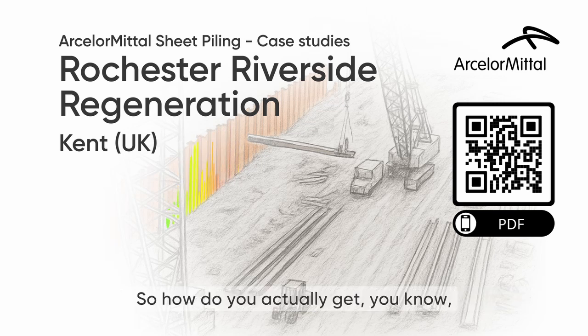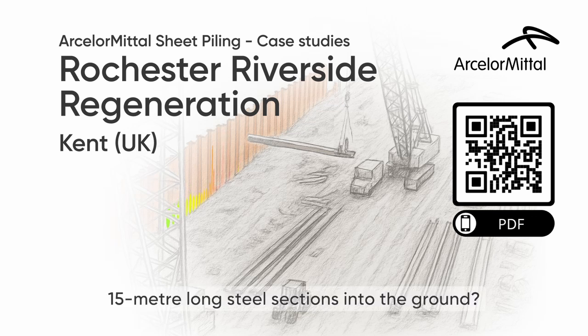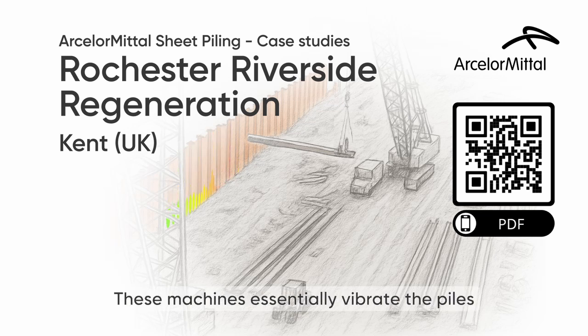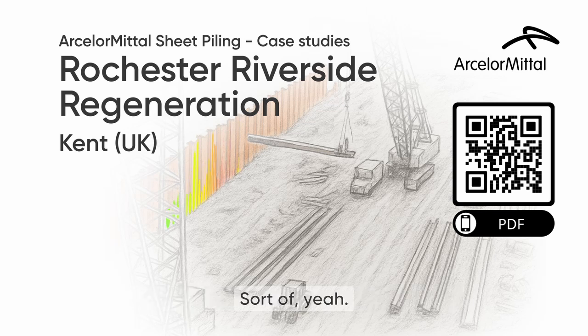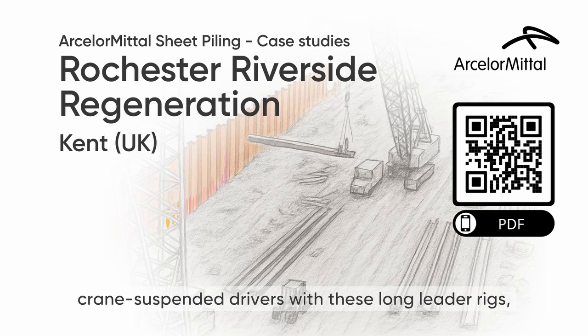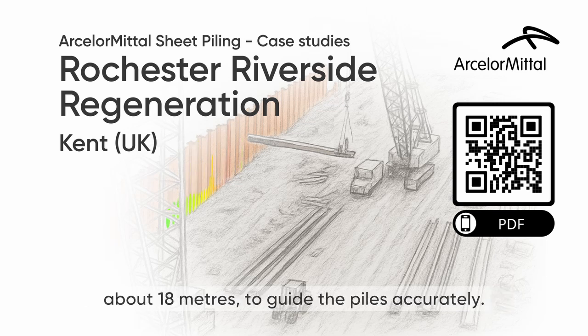So how do you actually get 15-meter-long steel sections into the ground, especially 4,200 tons of them? Primarily using powerful vibratory drivers. These machines essentially vibrate the piles down into the soil. Like a giant tuning fork pushing them in. Sort of, yeah. For some areas, like the creeks, they used crane-suspended drivers with these long leader rigs, about 18 meters, to guide the piles accurately.